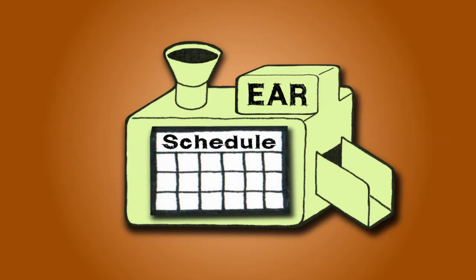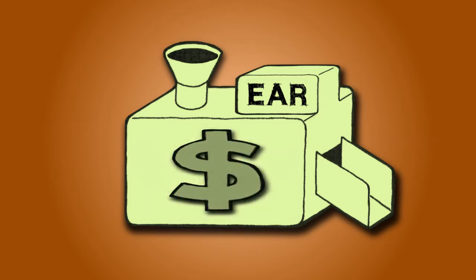Although the Estimate Activity Resources process is part of the time management knowledge area, this process is normally done at the same time as the Estimate Cost process that we'll discuss later in the cost management knowledge area.